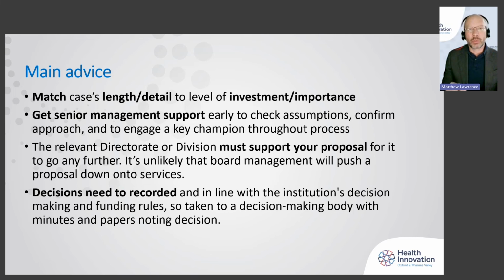So the first thing that happens when I'm in the hospital, it used to happen when I was doing this, is if someone brought a paper and took it to the finance director, or to the head of the division to say, I want to do this in my department, what do you want to fund? The first question they'll usually ask, either directly or indirectly, is: is the person in charge of that department aware of this, and do they approve of it? And if the answer is no, it's very unlikely they're going to take it forward. So you need to really get that on board.